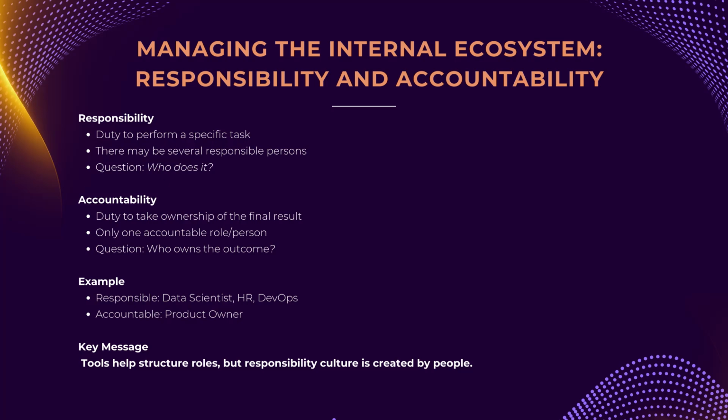Failures in internal organization cause reputational and financial losses externally. For effective governance, it is important to distinguish two concepts. Responsibility, the obligation to execute a specific task. Multiple people can be responsible. This answers, who is doing this? And accountability, the obligation to report on the end result and bear final answerability for it. There must always be a single accountable person or role. This answers, who owns the outcome?